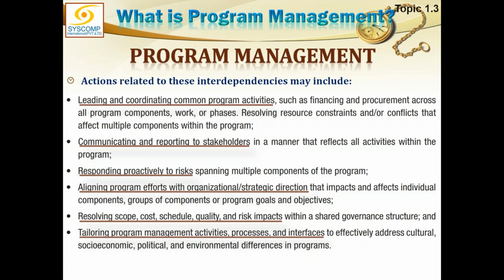Although I do understand that generally resolving resource constraints and conflicts is the responsibility of portfolio management from a higher perspective, this program is a package and the projects within it are not directly answerable to the portfolio, and the portfolio has no control exercised over these projects directly. Therefore all the resources for this program have been allocated to the program, and the program manager is then responsible for further distribution of these resources, resolving these resource constraints and conflicts at its own level. I hope this is amply clear.